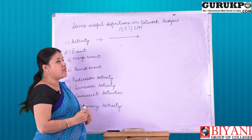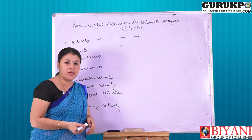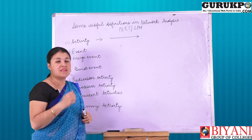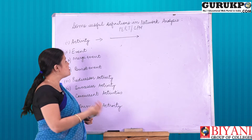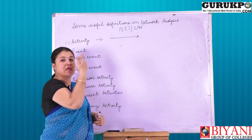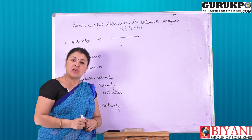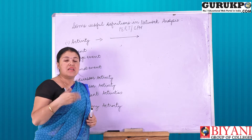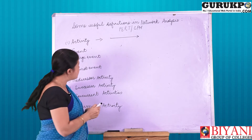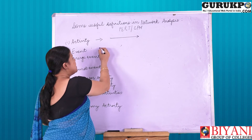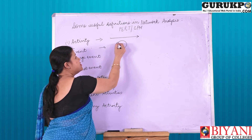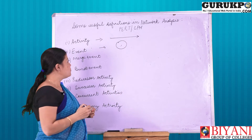Moving on to the next: event. An event is an act that signifies the ending of one activity and the beginning of another. It does not use any time or resources for its completion. It is indicated by a circle.